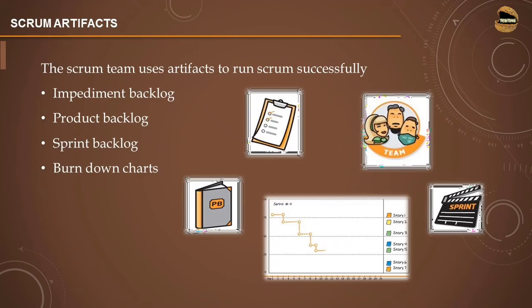The Scrum team uses a lot of artifacts to run Scrum successfully and help the organization meet expectations and deliver milestones. The first artifact is the impediment backlog — a simple list of hurdles, blockers, or impediments that cause waste in the organization. In simple terms, these are challenges you face: insufficient information, a team member on leave, or anything that prevents you from delivering the expected item at the end of the sprint.